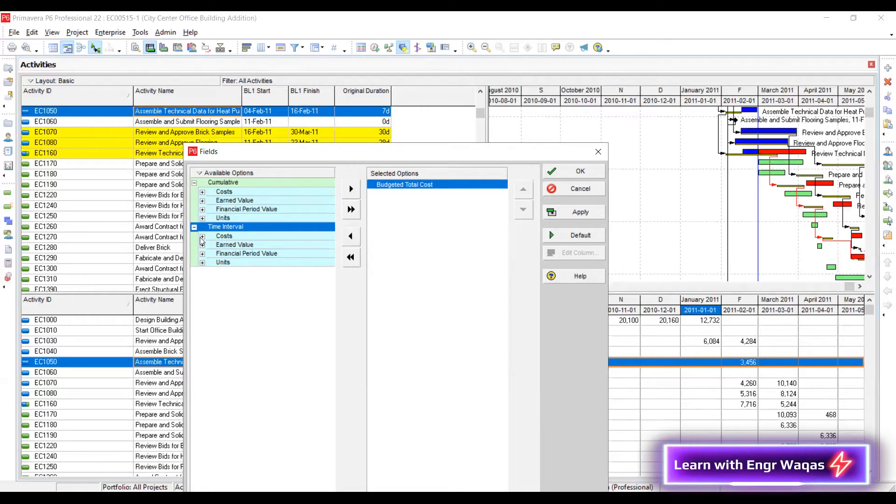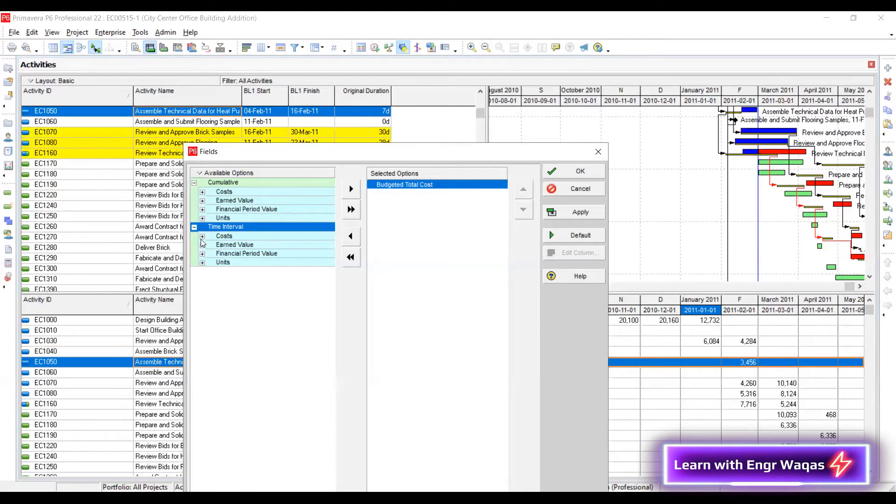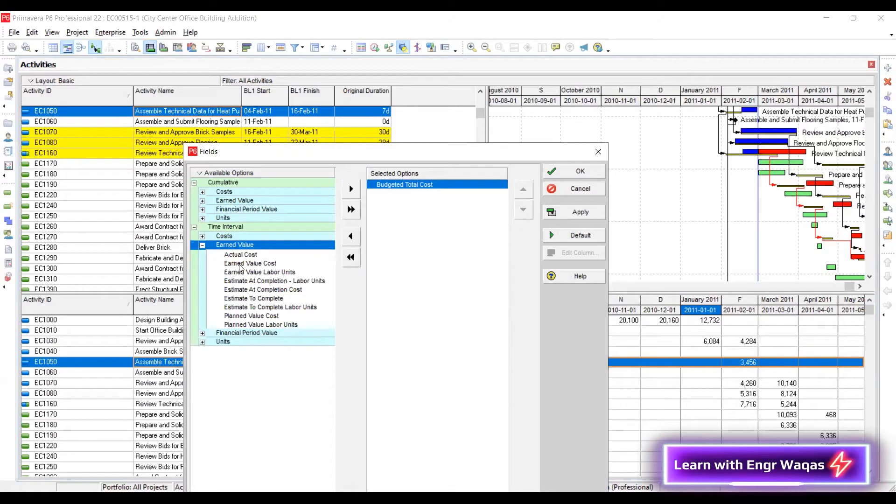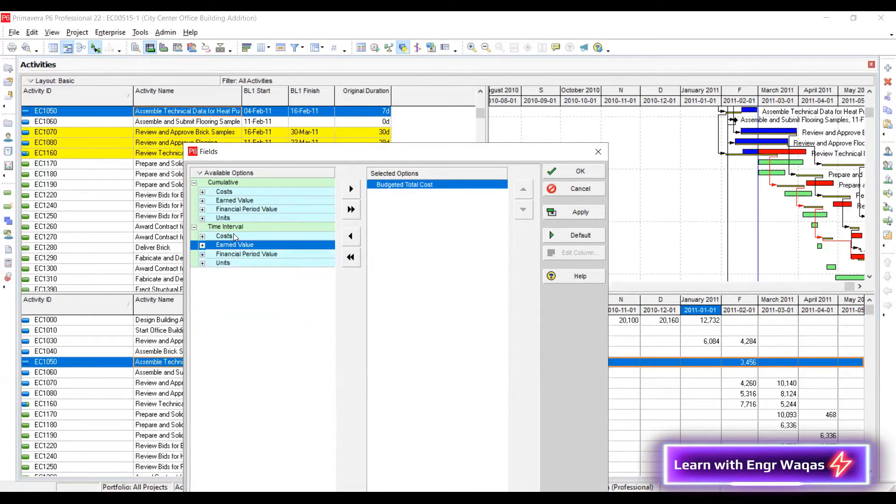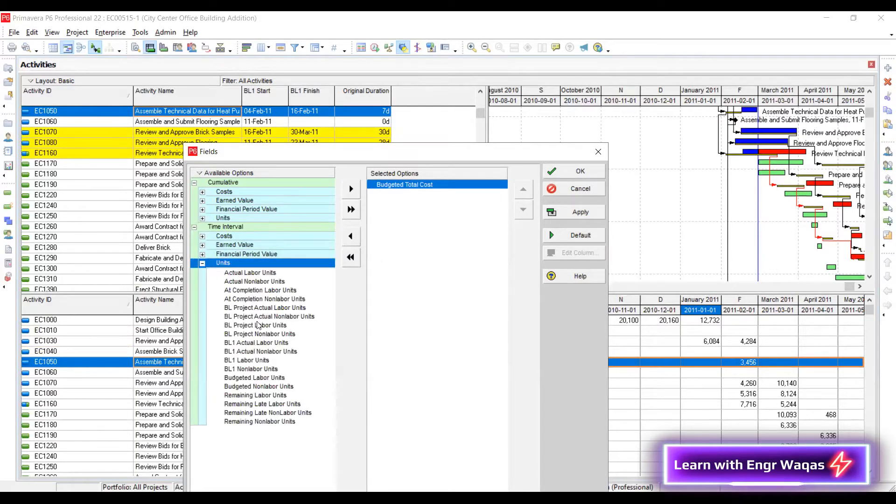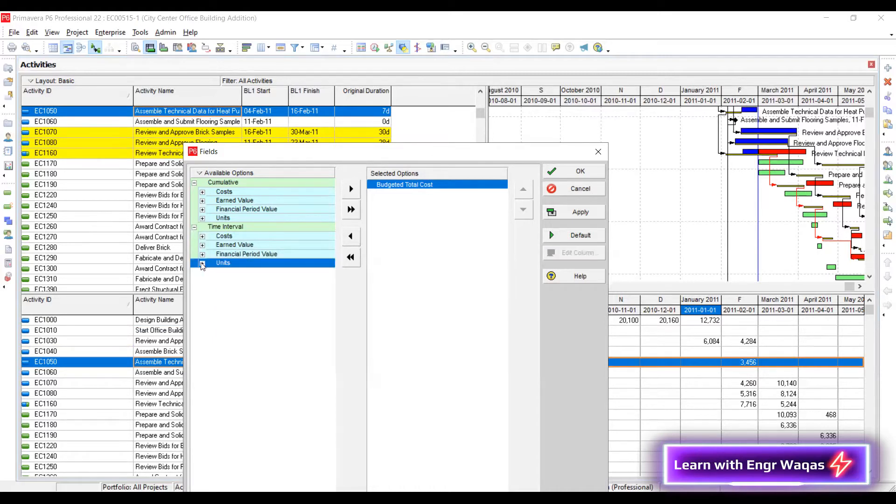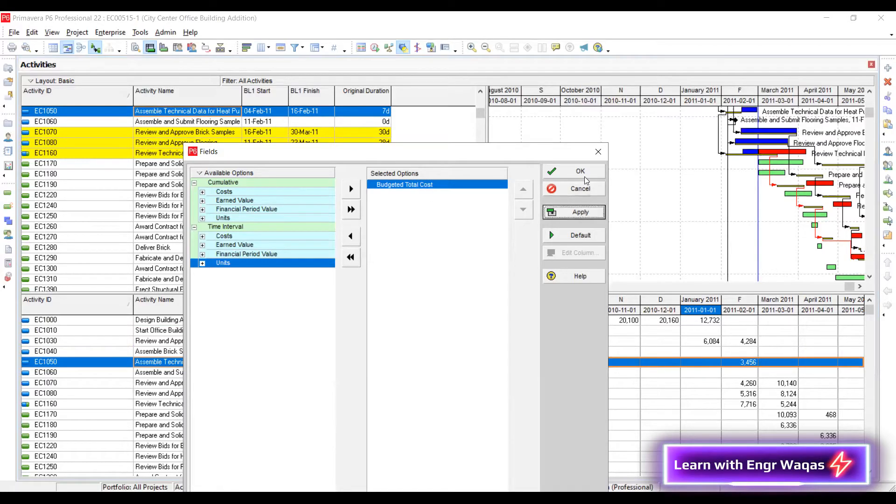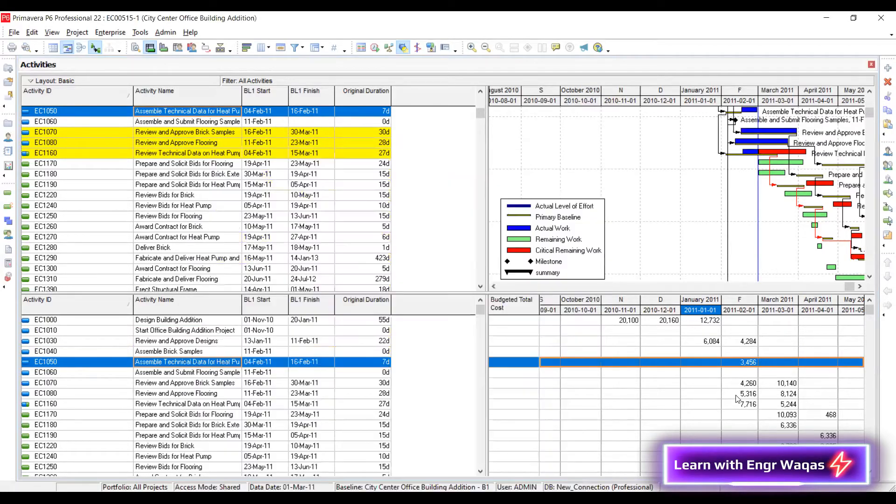So now I'm explaining this trick to you people. So here I need only cost. I will prefer my time interval cost. If you need some units, you can go there. There are units given as well. Here, see labor units, non-labor units, budgeted. See, you can go by your option. Got it. I have already budgeted total cost. Apply.